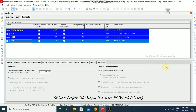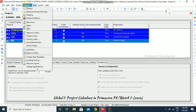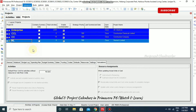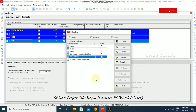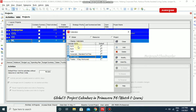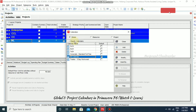Go to Enterprise Calendars. Here we have three calendar pools: Global, Resource, and Project. We can create Global Calendars, Resource Calendars, and Project Calendars. The Global Calendar contains calendars that apply to all projects — if you want a calendar that can be reused across any project, you add it to Global. You can assign either a Resource or Global Calendar to your resources, and either a Global or Project Calendar to activities. You can also link Resource and Project Calendars to Global Calendars.